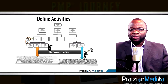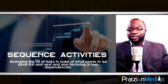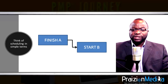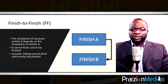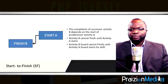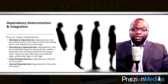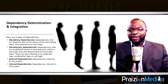Process 10: Sequence activities. This is where we employ start-to-start, finish-to-finish, or start-to-finish relationships to join those activities. Every predecessor should be linked to a successor, except at the end of a project. This is also where we discuss mandatory dependencies, discretionary dependencies, internal dependencies, and external dependencies.